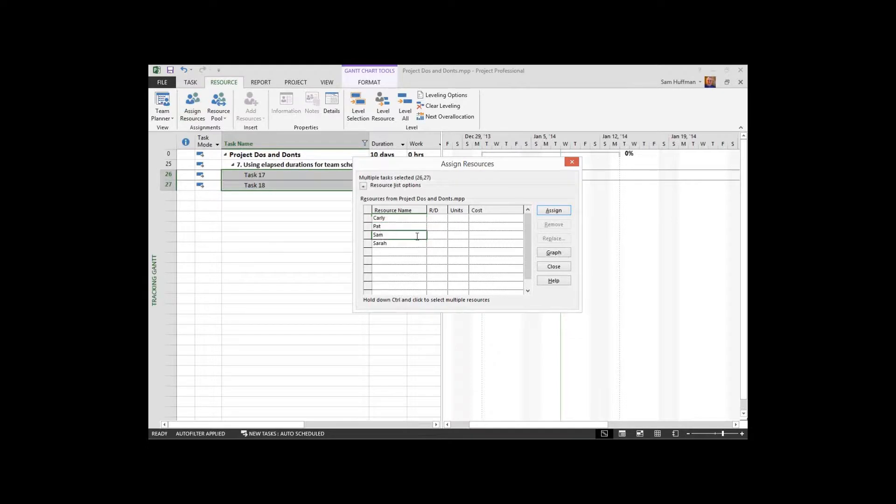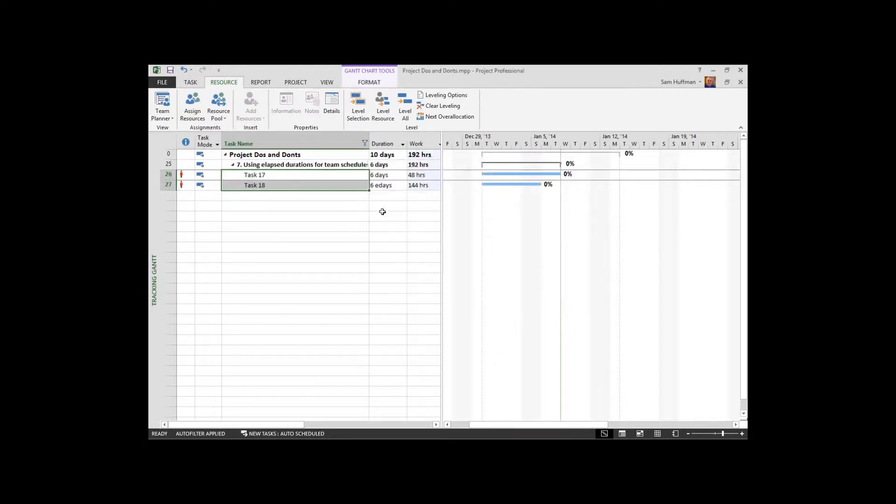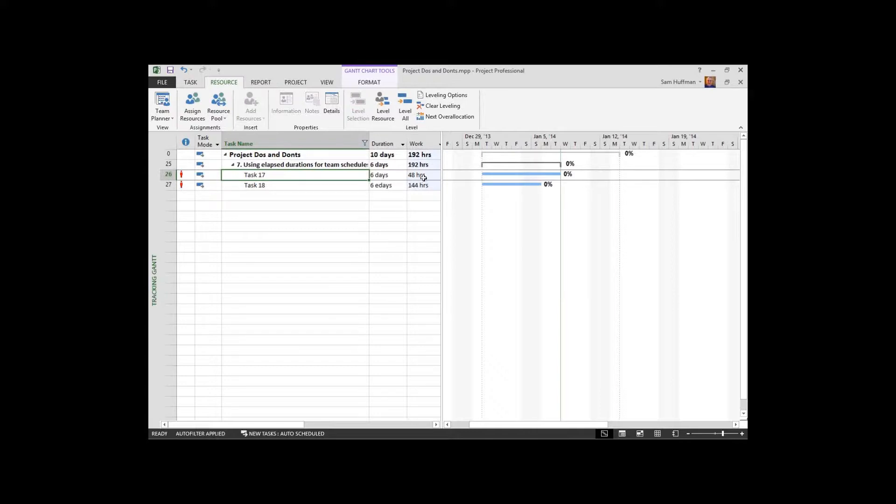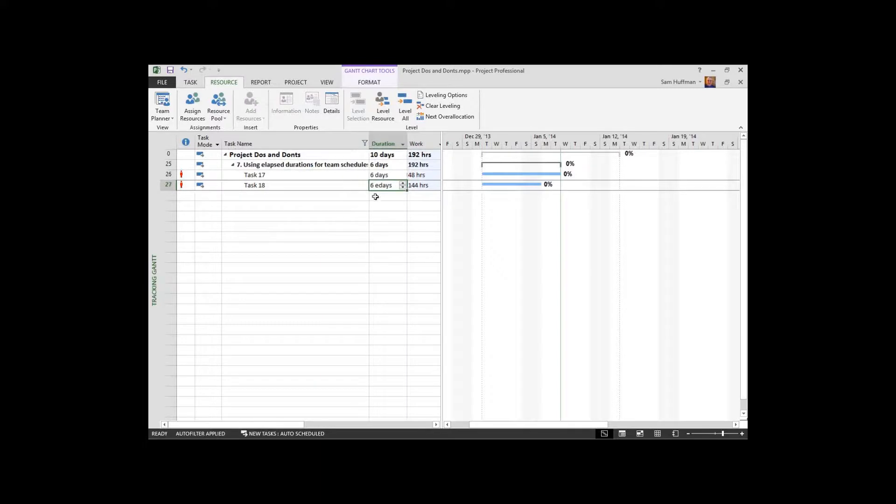I'm going to assign one resource to both of these. And yes, it will be over allocated, but I want to show you the ramifications. So assign a resource to a six day task with an eight hour calendar, 48 hours of work.